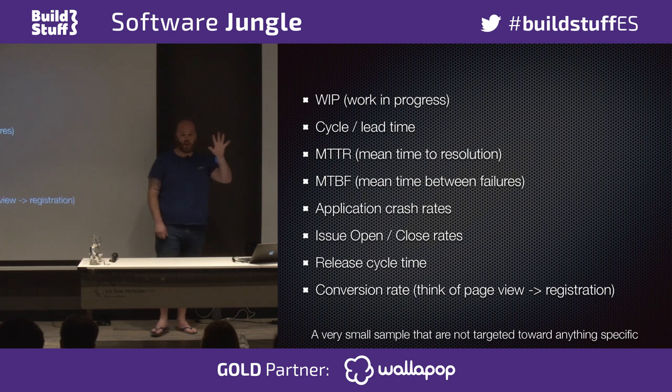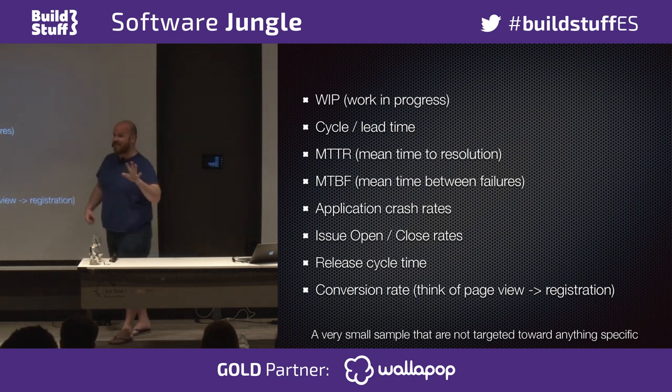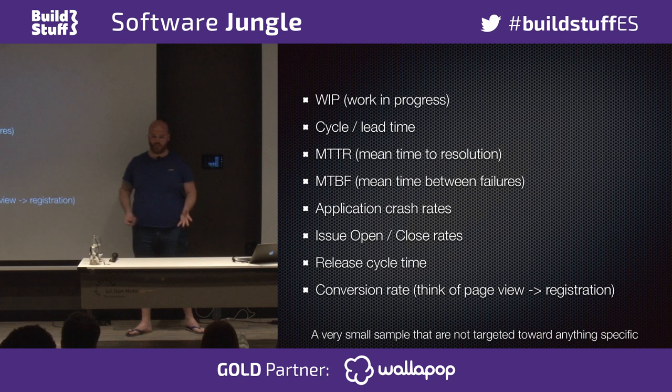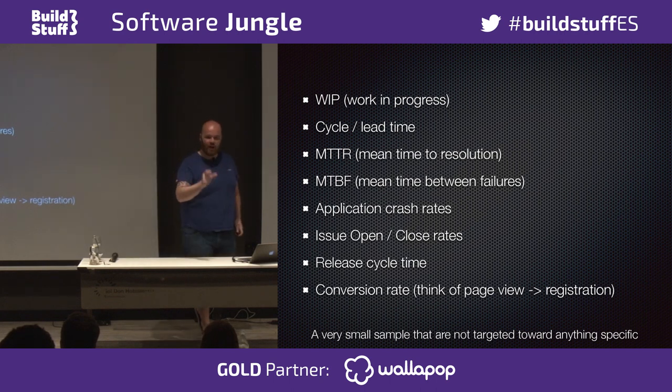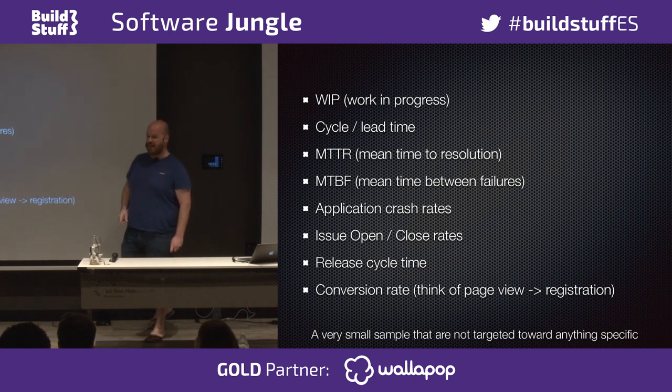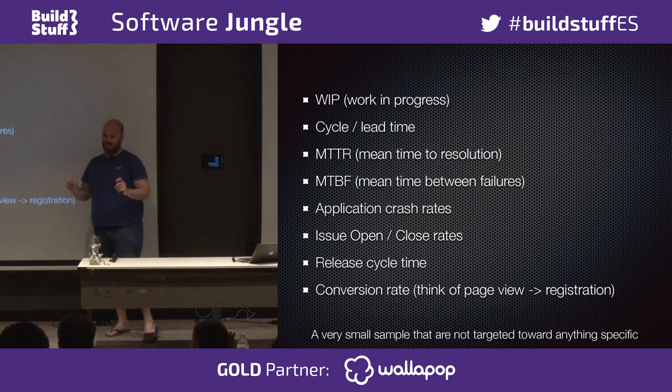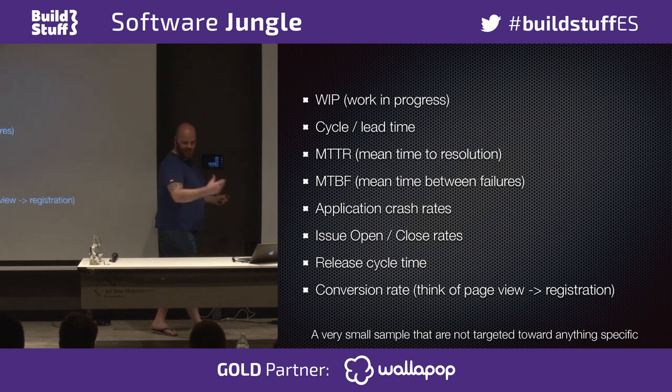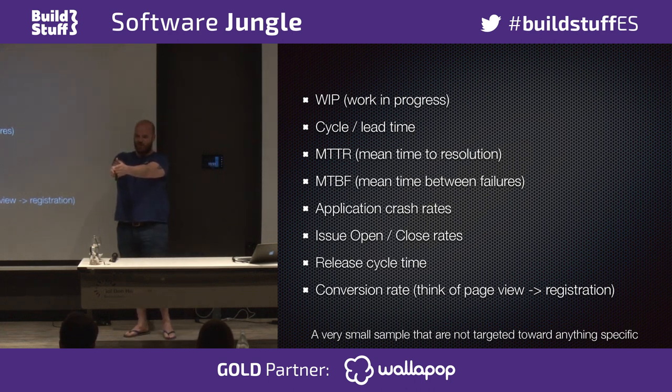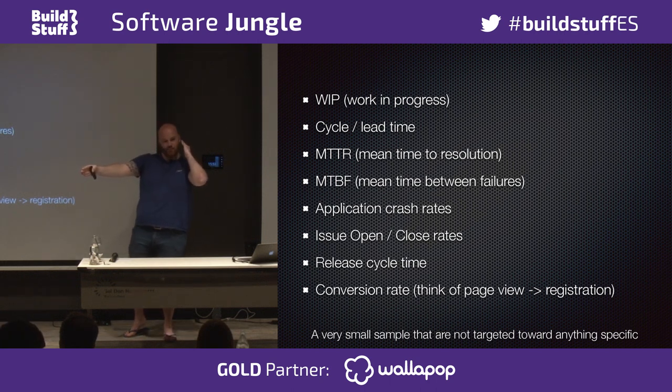And the reason it was 5 weeks is because there were 5 teams. If there were 6 teams, it would have been a 6 week integration time, because it took an entire week for each team to merge their code back into master. An entire week. Now, of course, that's not brilliant. So we went from finishing code on week 4 to the end of integration on week 9. And then QA would start at week 9 and go from 9 to 13. Now, the cycle time on that was finishing code on week 4.